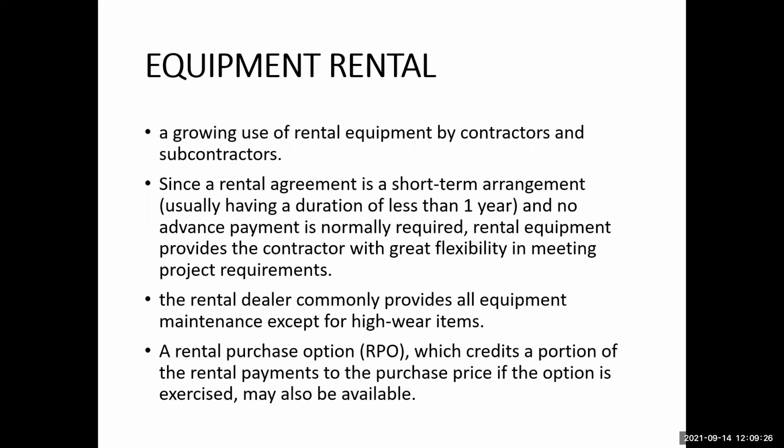The renting of the equipment is also quite popular in construction projects. A growing use of rental equipment by contractors and subcontractors is taking place these days. Since a rental agreement is a short-term arrangement, usually having a duration of less than 1 year, and no advance payment is normally required, rental equipment provides contractors with great flexibility in meeting project requirements. So renting the equipment against buying the equipment is a decision which some contractors need to take.